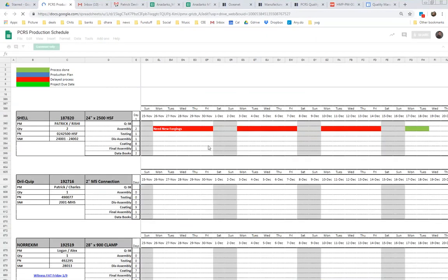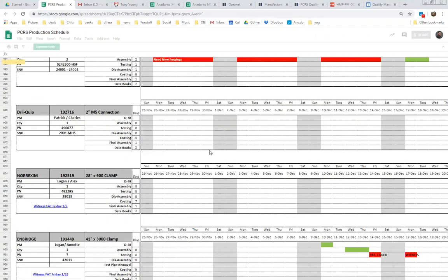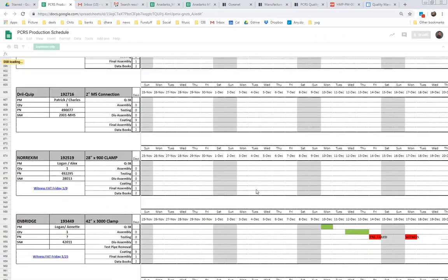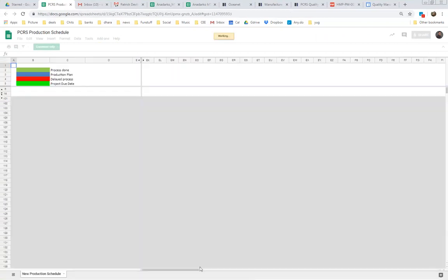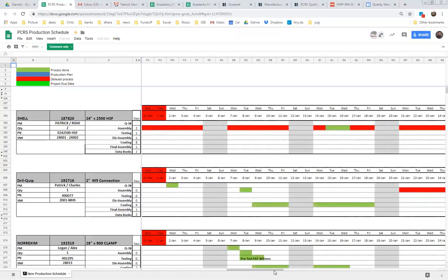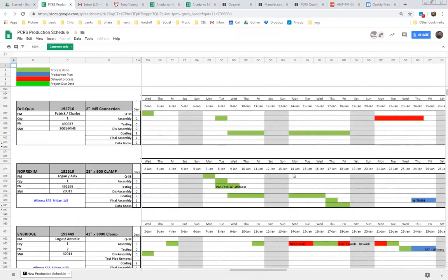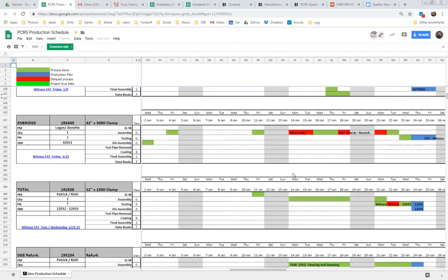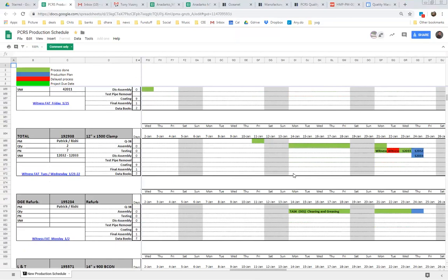So every Monday we go through all the things which are either in the works or coming. This is a schedule Steve Baker, the first guy in the row, manages, and he says which items are in production, whether there is a delay, or where they are. He will have a 2-month lookout for items in production, and he will say we'll focus on that week and the week after: these are the items they're building, this is where it is, this has issues, all that stuff. So it's a macro level of production planning.